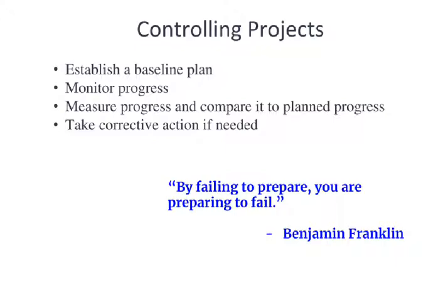What we are going to be doing is developing a project plan and then working the plan in order to control what happens through the duration of the project. Project control is important. It is critical. Projects don't just happen. They need to be intentionally executed. And so there's really four big steps involved in that. There's establishing the baseline plan. In other words, we understand the needs, we develop the proposed solution, we put together projected schedules, projected resource utilization charts, and we have a plan.